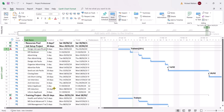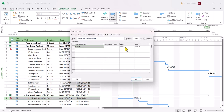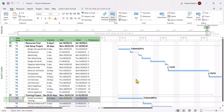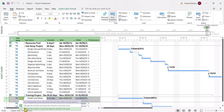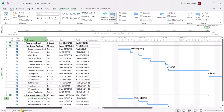And be careful of the second option as well for the Health and Safety Training. Again, I'm going to double-click, change this to 80%, and click OK. Again, I don't want the days to change — I want them to be the same. It's just a different allocation of percentages. It's just a matter of catching the little drop-down arrow carefully, and I'm going to change the amount of work, keep the same duration. And there we go — five days. So we've got an 80-20 split.